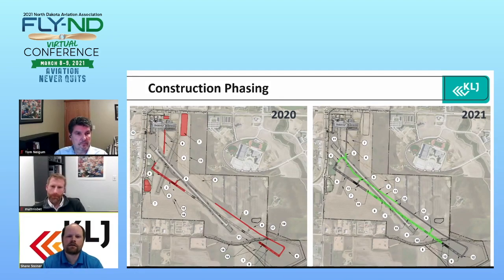The second thing was that it did allow additional time for if anything came up as far as bad weather the first year, or the cultural findings. If there was something, it would allow a little bit of flexibility for us to do that. So with all that being said, we did end up moving forward with the 2-year construction, and that's what you see on the slide right now.